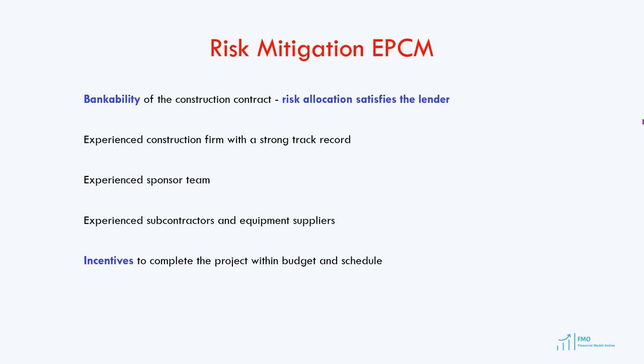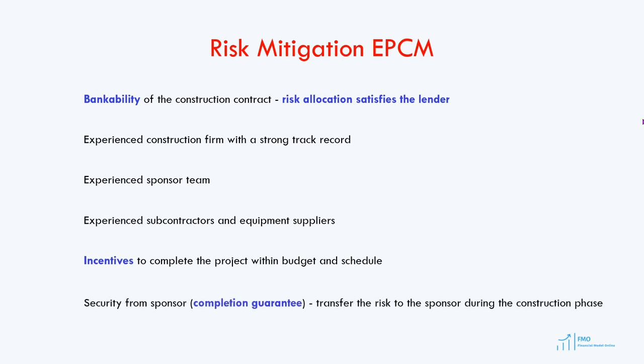However, with all these risk mitigation strategies, a significant construction risk will still remain under the EPCM contract. This means the lender will typically require security from the sponsor in the form of completion guarantees, cost overrun guarantees, and other guarantees that transfer the construction risk from the lender to the sponsor during the construction phase of the project.